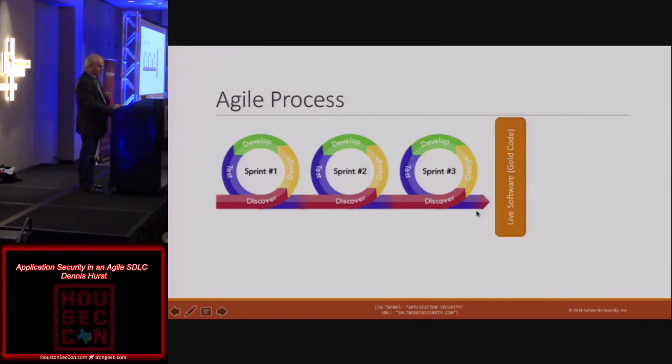When we get to this point in the process, and this is where security a lot of times gets involved, and here's the killer for you. When you get to this point, this is not software that's going to go back to development. It's gold. It's shipping. It's actually going live, and it's actually a product. If you're getting involved way down here, you're dead. It won't work. You're going to have to delay a release, and it's on you, not on anybody else. So you've got to get involved in the stream much earlier in the process.